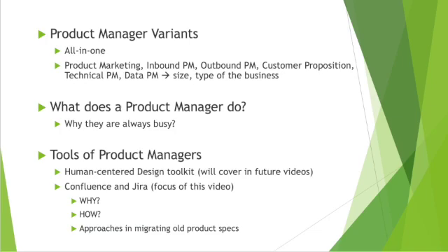Once a user story is completed, the product manager can walk through the requirements with the dev team and the testing team, so that firstly, the team understands the requirements, and secondly, they provide the effort estimation. Once that's done, the user story is ready for the sprint planning meeting.